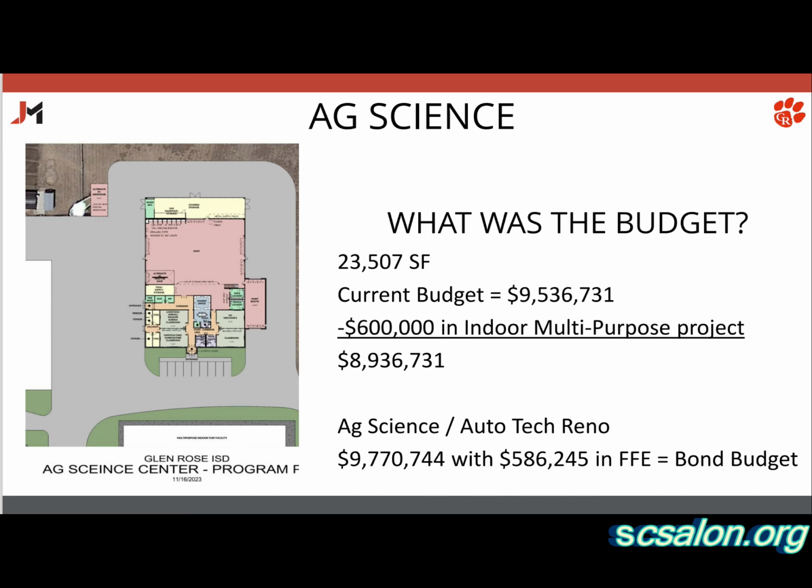I did, and the concrete person misinterpreted a detail, and they're taking the piers. When the interpretation was given by the structural engineer, it increased the cost of the spread footings, and so they took the piers because it was cheaper than the spread footings. We were right in looking at $420,000, but. That's what I thought it was. Yeah, I just texted Jared.